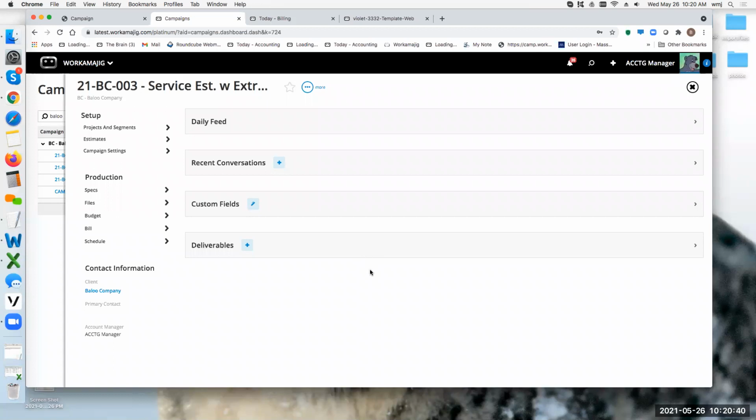Okay. Once the schedule is set, does it send you a reminder to bill, or does it just automatically create an invoice? It does not automatically create an invoice. If you're using billing worksheets, the billing worksheets will look at your billing schedule to know when this campaign is ready to bill. It's like any other project that has a billing schedule or has transactions to bill. Once you run billing worksheets, it's either going to look at your billing schedule or it's going to just look at, do you have an available to bill? And then it shows up.